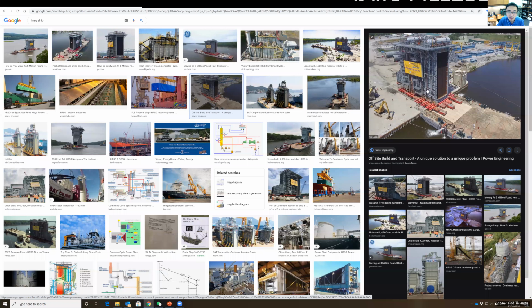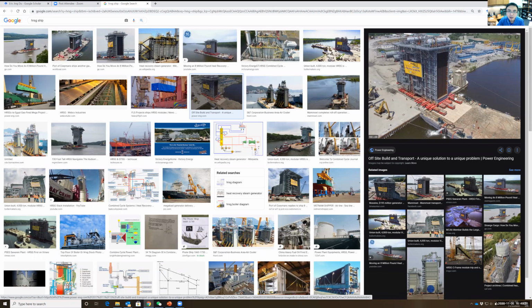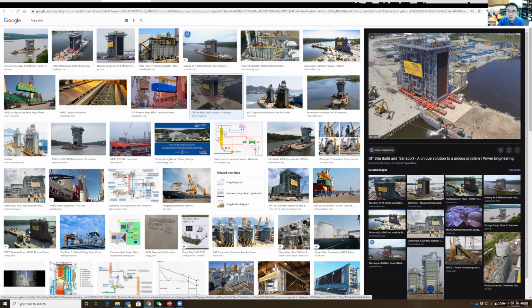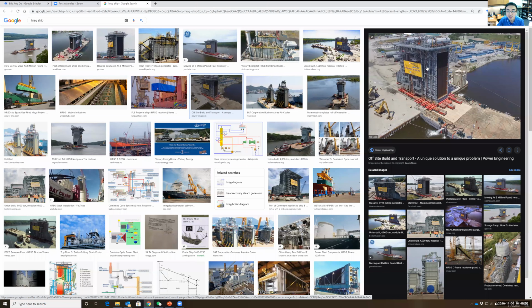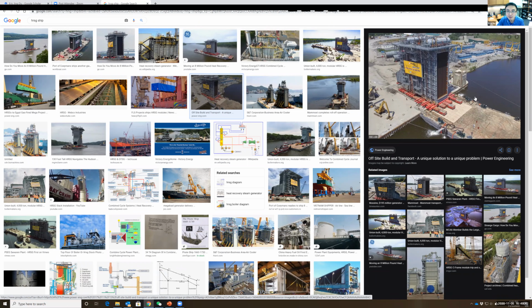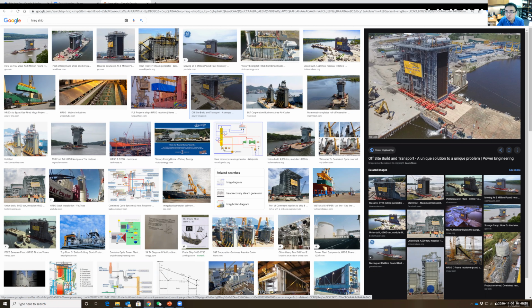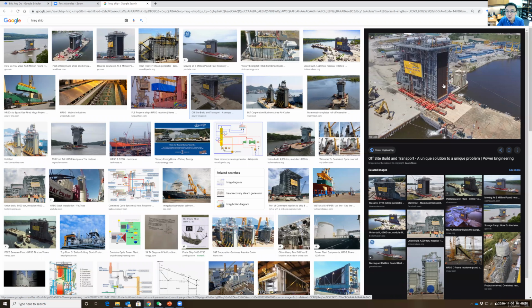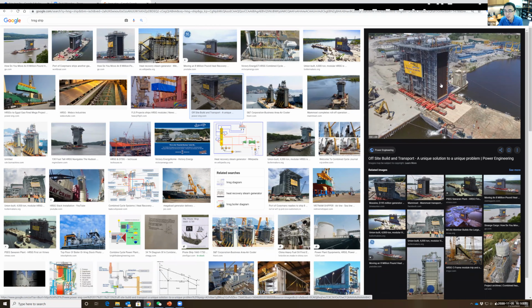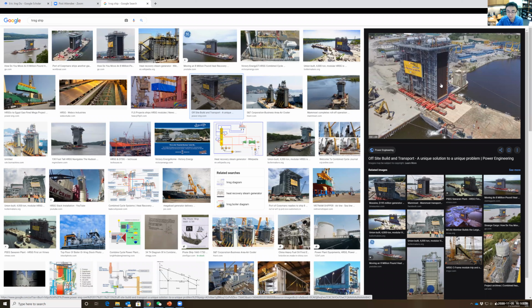So when they move this thing to Freeport, Houston, they figured out about 7 or 8 traffic lights must be removed, because it is the only way to the job site. They also figured out they have to totally remove a bridge and rebuild it. So just moving this monster from the Port of Houston to the job site, which is only about 10 miles, took them another month because of logistics concerns.